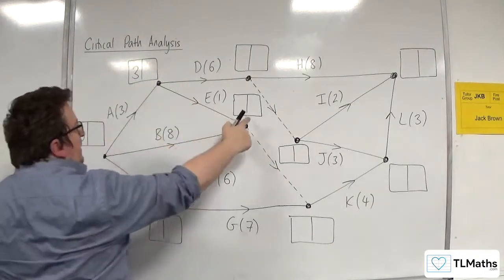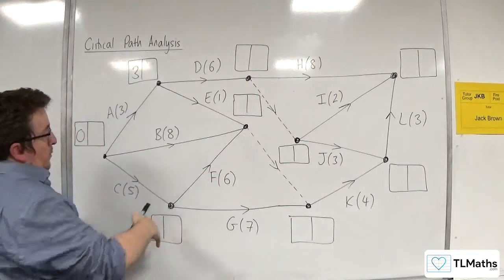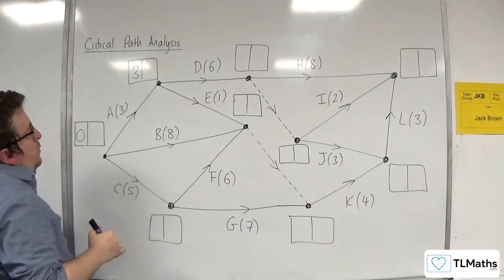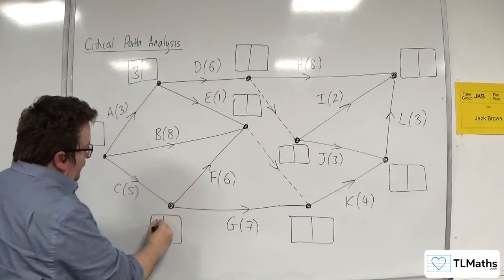And we're not going to go to this one next because there are two routes going in, or three routes going in rather. So we're not going there yet. We'll go to this one next because there's only one route going in there, so that goes in 5.